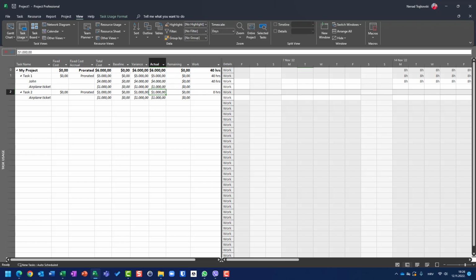So to conclude this video, when you have a task which has a cost resource assigned to it, and also one or more work resources, persons, or groups of persons, and you mark this task as 100% completed, you should manually put the actual cost for the cost resources.